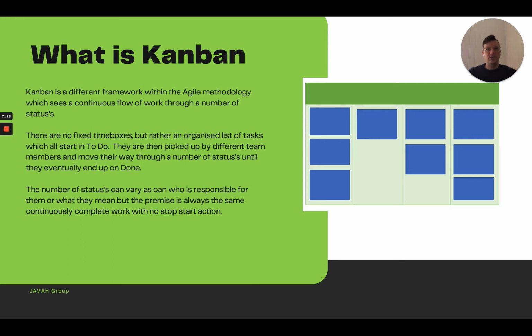Generally, what will happen within this is that you will set up meetings and discussions amongst your team at set intervals, but they won't follow the same pattern as Scrum, where at the start of your 2-week block you plan, and at the end of your 2-week block you do your retrospective and those sorts of things. These will more be based on a calendar. So maybe it's the first of the month we get together and have a discussion about how last month went. Maybe it's the first of the fortnight. And then at the end of the fortnight or the month, we'll get together and say, well, what would we like to apply next month to this process? You also might have showcases in there where at specific periods you show what you've completed and how many more cards have moved into that status of done.